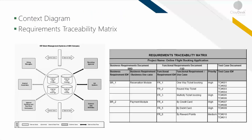Here's the contextual diagram, and the requirements traceability matrix is simply a document — a grid — that you can use as a project manager. The context diagram shows internal user profiles, external job postings, internal job postings, hiring managers, internal associates, full-time and part-time contractors. The left side has internal users and the right side covers external users. The traceability matrix is something you log down based on different IDs, requirement descriptions, business needs, project objectives, and work breakdown structure deliverables.